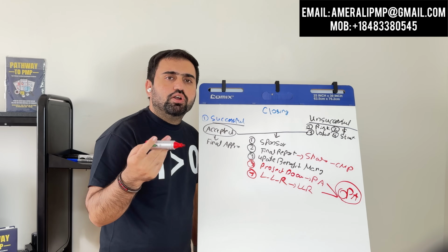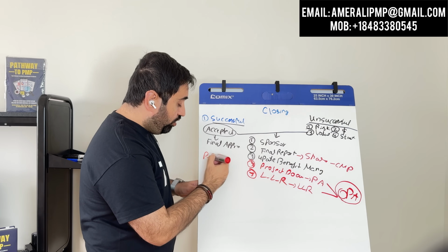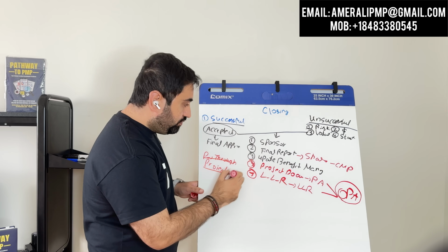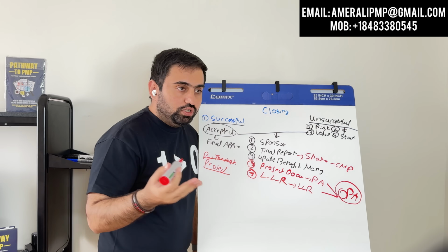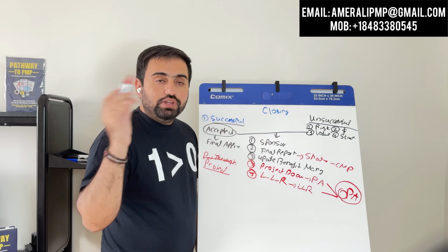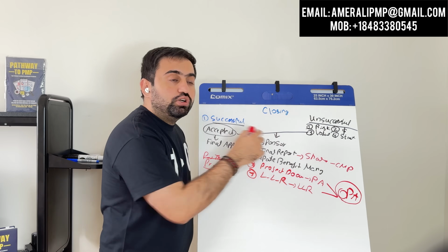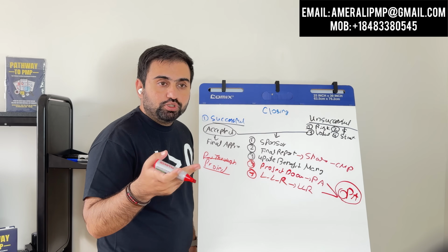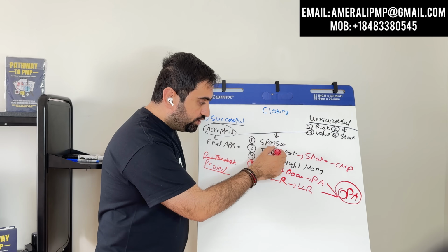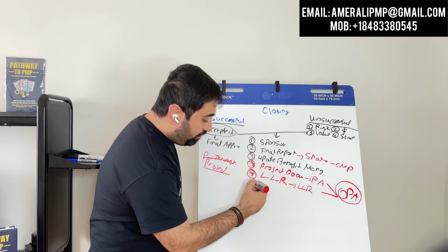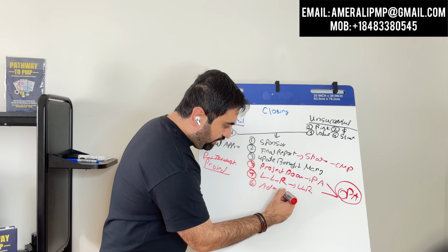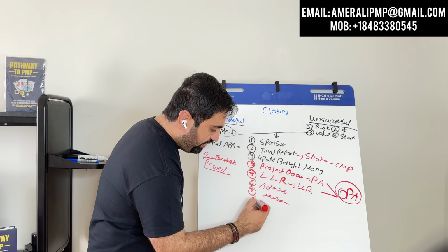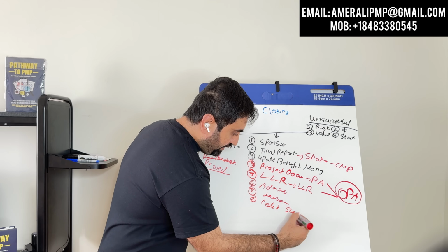Many people ask, what about the procurements? Procurements are closed throughout the project. And before closing the project, if claims are open, if things are open, we will escalate that to the procurement department and we will put that in the final report. These claims are open, and if there are some lessons learned from the previous project, we will also put them in. Once the sponsor has the final report and all the documents are updated, we do administrative closure, ask the team to leave, like release the team, and finally maybe celebrate success.